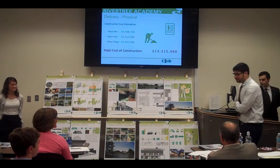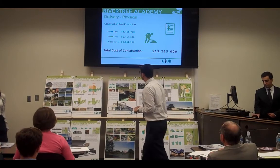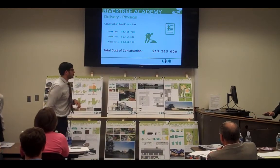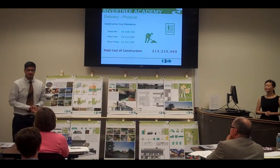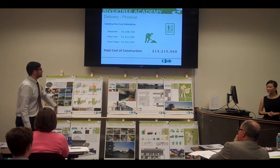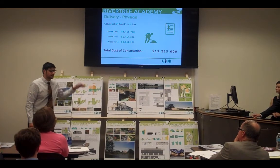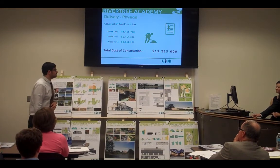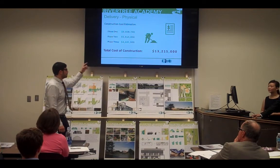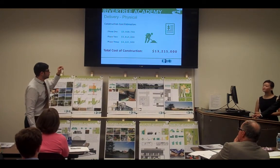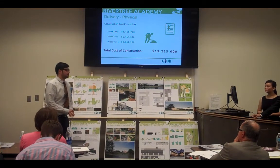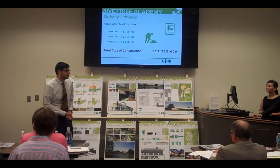This is Mohammad Farzad from Iran, a construction management student. Let's talk about numbers. As you saw in the video, we calculated the cost for each building. Here is the total cost for each phase, which provides a good cash flow for the total duration of the project. The sum of these numbers gives the total cost of construction, which is $13,215,000.